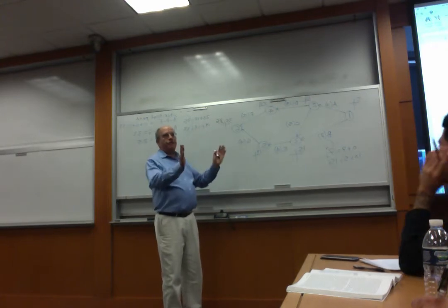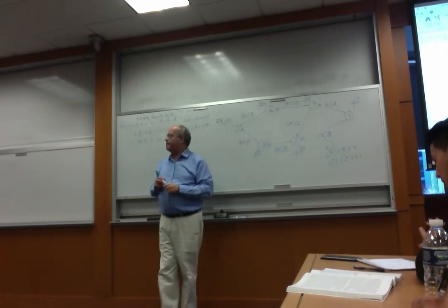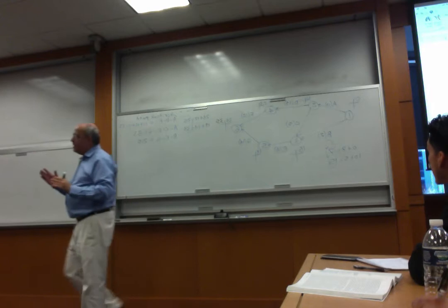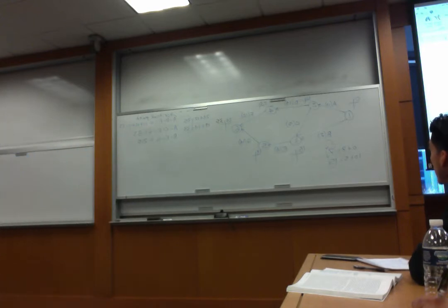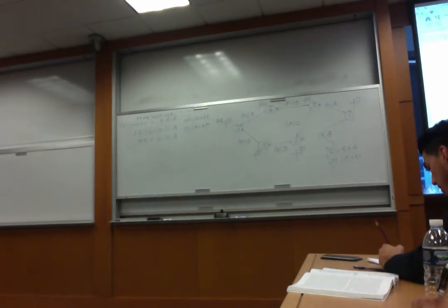So now the second half. What is the second half? The second half is we start from the terminal point. So we start with 6. Look, I used two different colors, blue and black. On the terminal point, we say top left and top right, same number. We ended up with a 35, we put a 35.